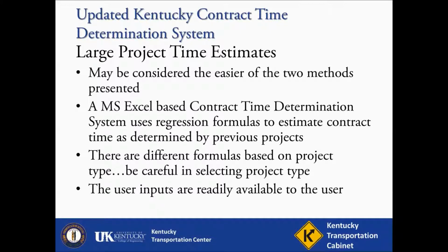These formulas are based on data from previous projects and provide a range of duration estimates. Additionally, these formulas are divided according to project type, so a fundamental step in the large project process is selecting the appropriate project type. The ease of use comes when the user inputs being quantities that should be readily available to the user. In other words, there is no need to research production rates or other items.